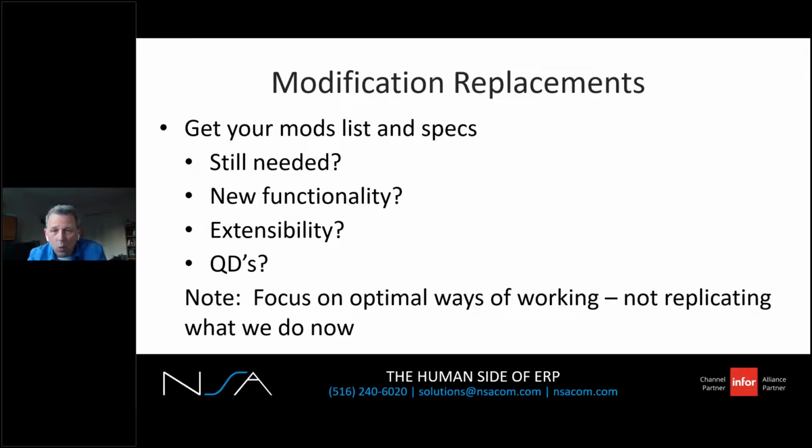Always start with the question, what is this mod? And prove to me you still need it. Furthermore, do an ROI analysis, or return on investment analysis. Ask the tough questions. If a mod costs you 10 grand to develop, but it saves someone a few hours a week of data entry, it'll take you 10 years to make your money back. So ask, what does the mod save and what would the workaround be, so you know how much effort to put into finding a replacement.